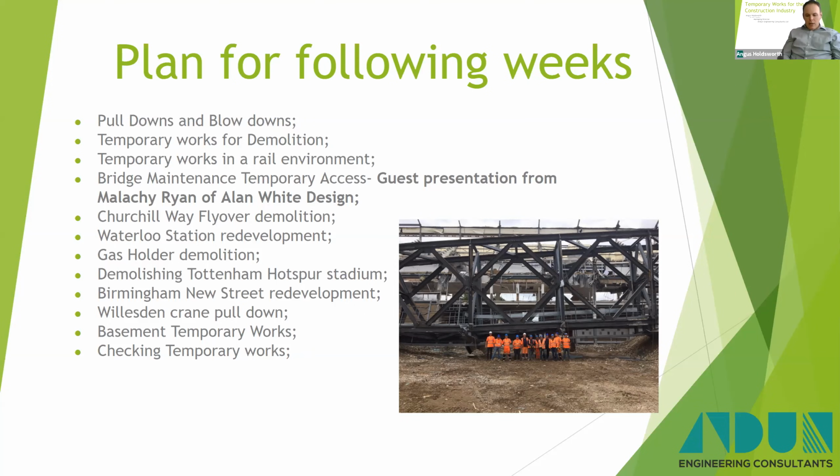Now the question of, is it the right way of preventing the collapse? No, a scaffold's not. So the demolition has got to be planned and undertaken in a way that the scaffold is not being relied upon to stop the structure collapsing. So it's going to take a bit of a step change in the industry, I think, to stop putting scaffolds up. There is a solution I've seen from our demolition.